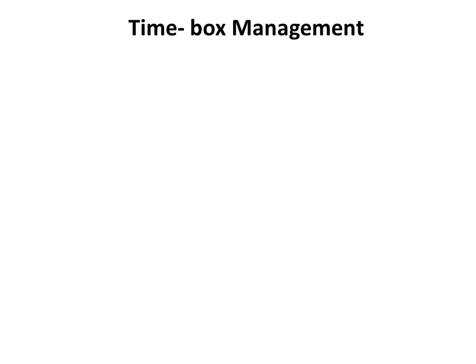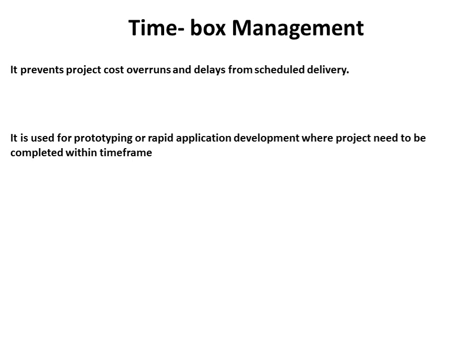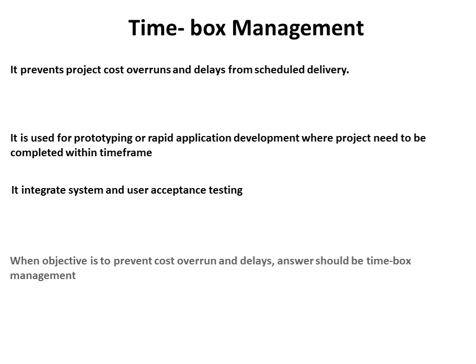Time box management prevents project cost overruns and delays from serial delivery. It is used for prototyping or rapid application development where the project needs to be completed within a particular time frame. To help save time, it integrates system and user acceptance testing. When the objective is to prevent cost overruns and delays, the answer should be time box management.